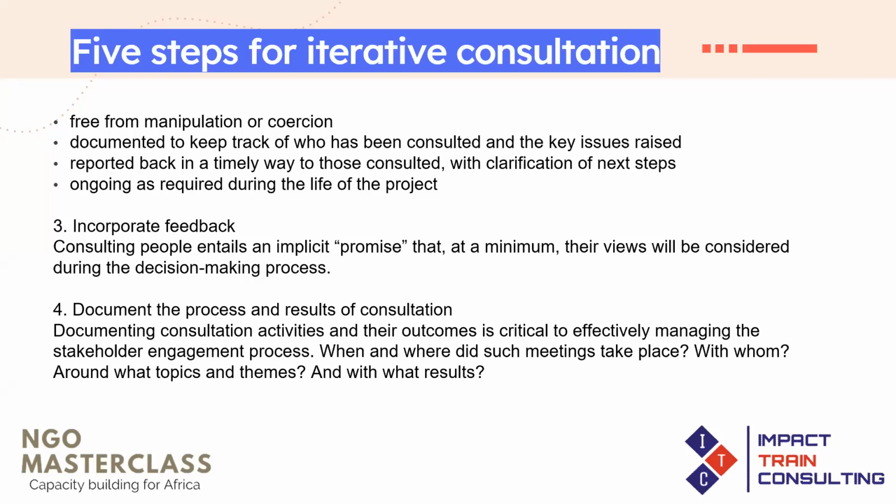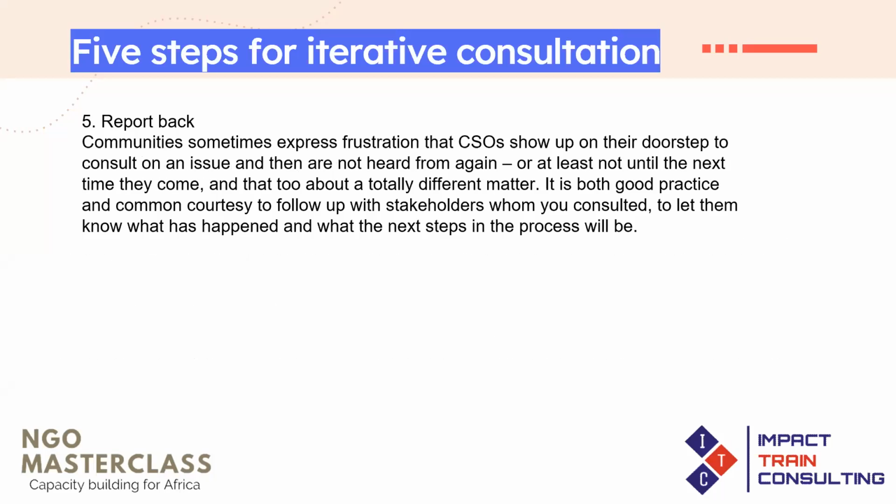So you can develop a table that will enable you to answer these key questions: who do we consult? Where did we consult the person? How, in terms of what method, did we use in consulting them? What topic did we discuss? What are the results? And what are the next steps? So that allows you to take charge of your consultation. And the next step that I want to talk about is report.